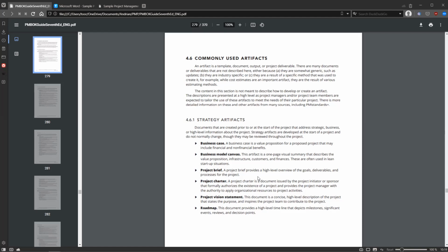It's not necessarily done for all projects, but it's a very good practice to have such a formal document to define what the future project is, how this will be achieved, known information about the project, known risks, and have an official confirmation from the project sponsor or initiator to basically say, yes, you start this project.